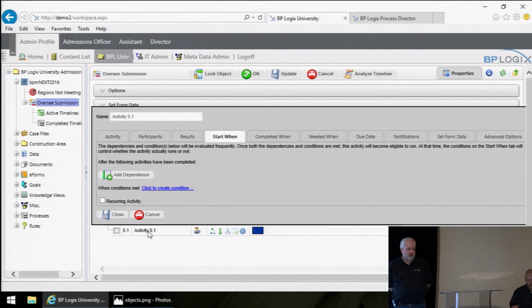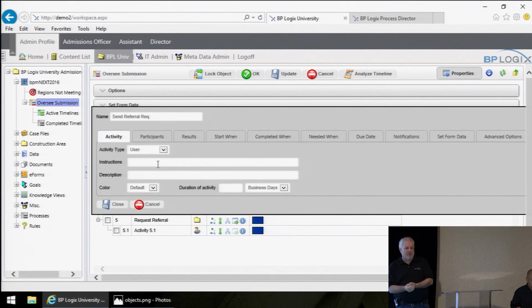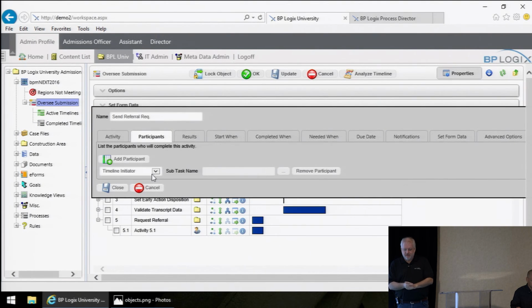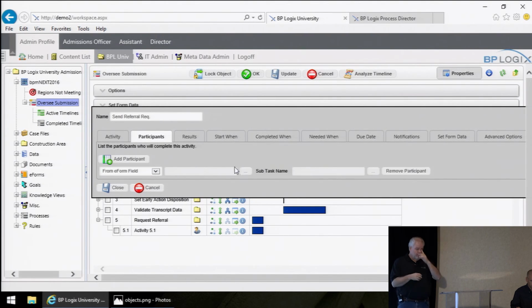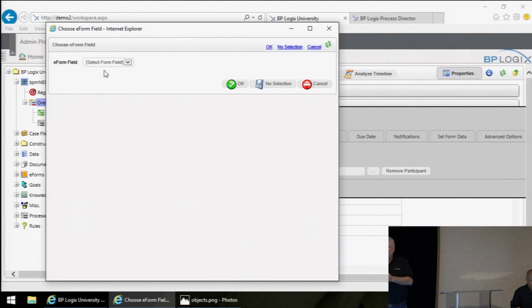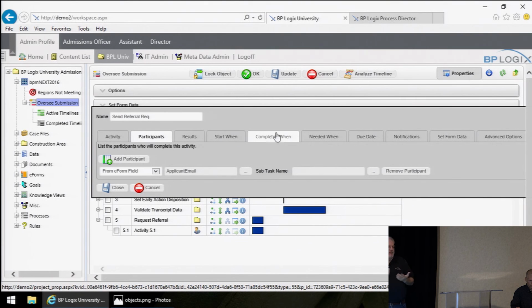Every one of these segments or snippets, as well as each individual activity, can be controlled so that it always wants to run and is going to run as soon as it has the opportunity, based on, remember, precedence, eligibility, and necessity, in that order. So we're creating this section that doesn't have a precedence. It's not waiting for anything else to complete, but it is waiting for certain KPIs to be met, or in this case, fail to be met.